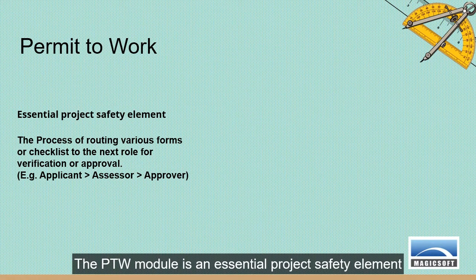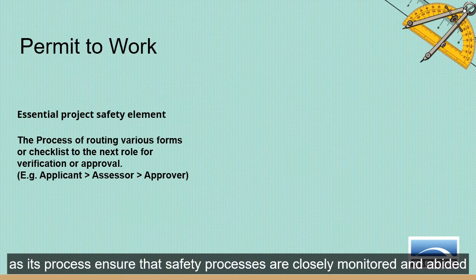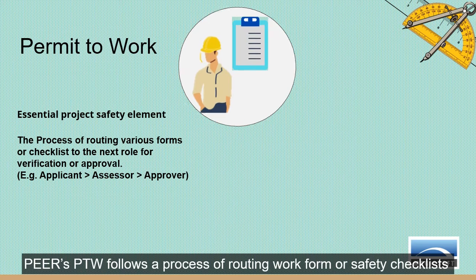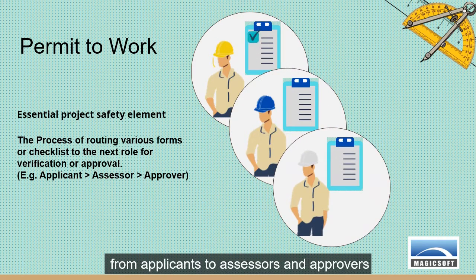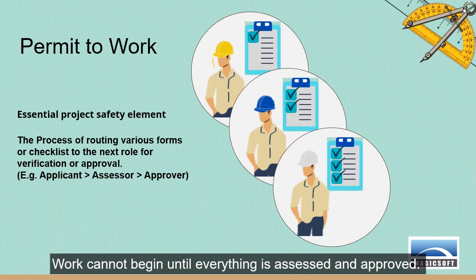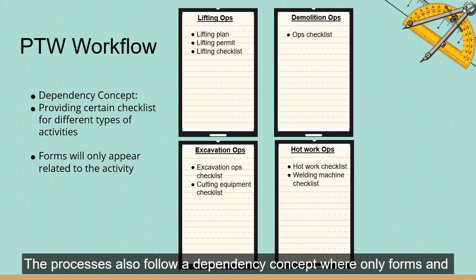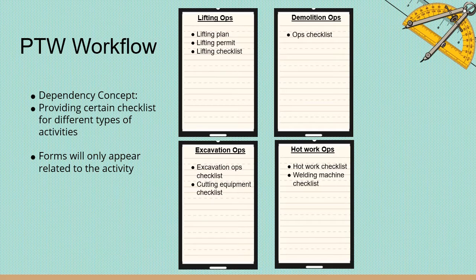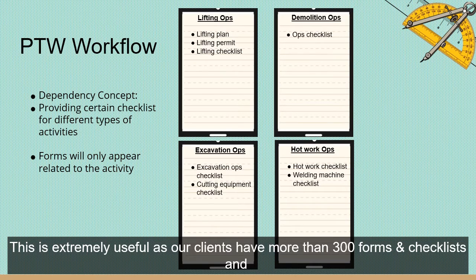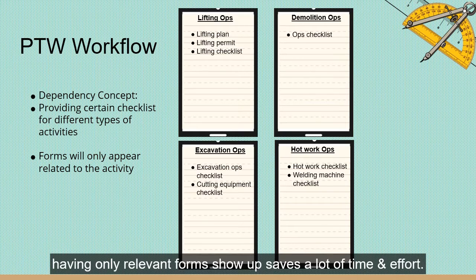The PTW module is an essential project safety element, as its process ensures that safety processes are closely monitored and abided. Peer's PTW follows a process of routing work forms or safety checklists from applicants to assessors and approvers — work cannot begin until everything is assessed and approved. The process also follows a dependency concept where only forms and checklists relevant to the job scope will appear, saving a lot of time and effort.